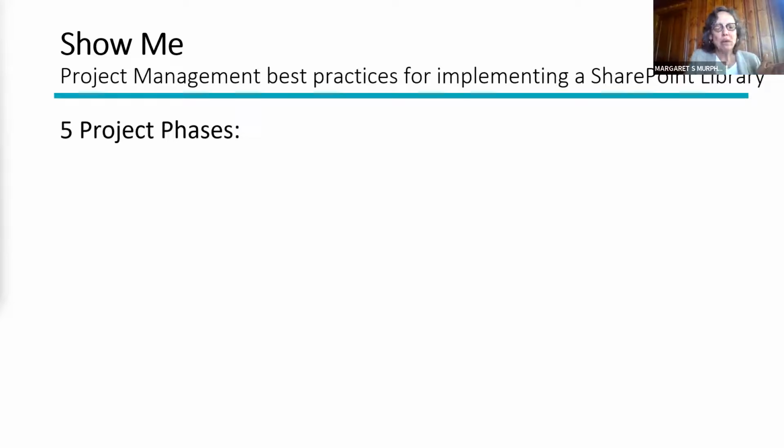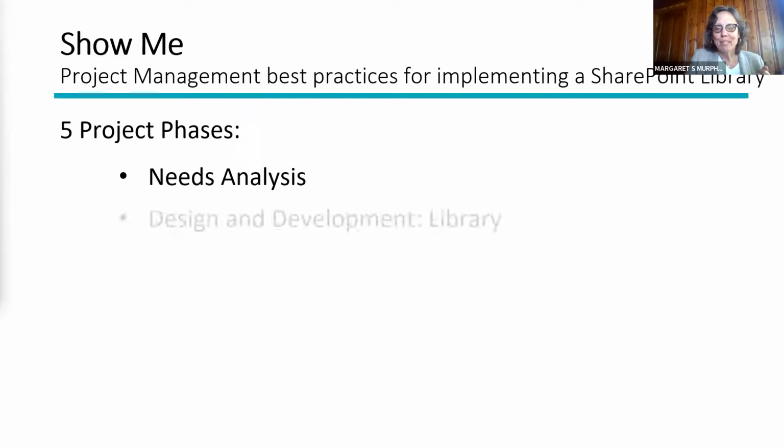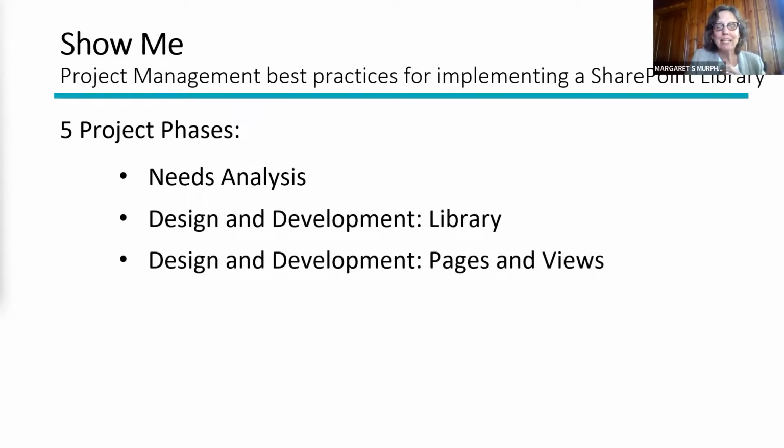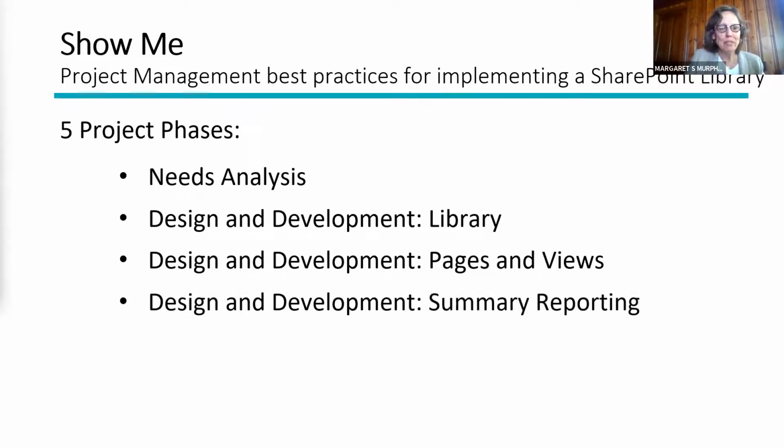We also had 5 project phases: needs analysis, design and development of the library, design and development of pages, site pages, and the views, design and development of any summary reporting that might be needed, and the implementation and evaluation phase.